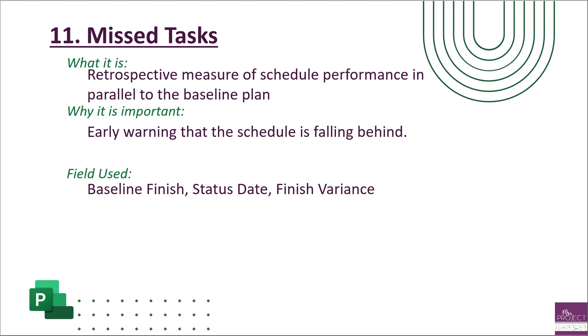Project has many multiple baselines like baseline one, two, three, and four. It only calculates the variance based on your baseline zero. So you're going to look at that baseline zero and your finish variance.